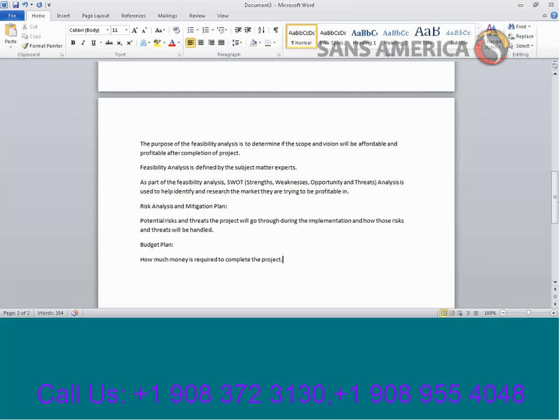This first, initial estimate provided by the technology manager is called the L0 estimate, level 0. The L0 estimate is a high-level budget estimate which gives a ballpark budget required for the project to be implemented.